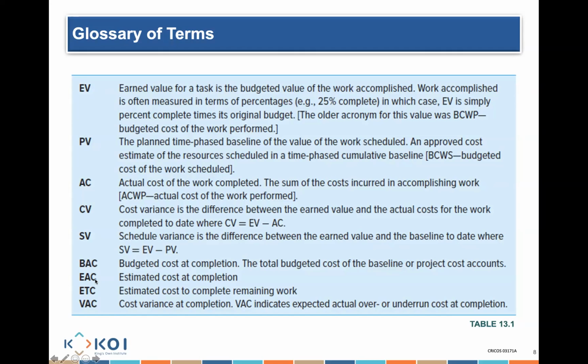And that's why you need something called estimated at completion. Because I might have budgeted that something's going to cost me $100, but my estimated at completion is going to now cost me, I don't know, $140, because it's actually taking longer for me to get a particular work completed.